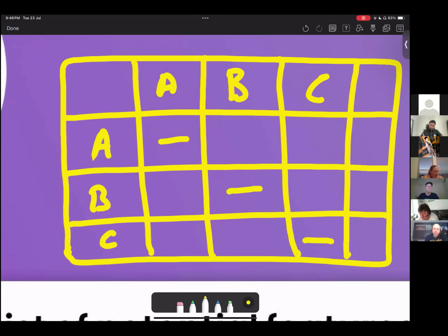So if I compare A with B, and suppose feature A is more important than feature B, I will be allocating number 1 to A. If A is more important than C, 1 score would be here, right? Now in B, if I compare B with A, we have already discussed B is less important and A is more important, so I will be writing 0 here.